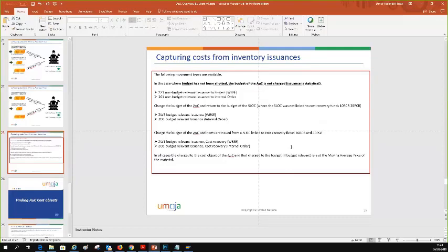So what I've seen is that RDC are tracked with internal orders, and for any new project after 1st July 2018, I see the WBS element. I see the project breakdown structure, which is good because it also simplifies the life of inventory managers. So inventory managers, if you are told to issue materials for a project, the first thing you need to ask engineers is for the WBSE code. Give me the WBSE code. What is the WBSE code?